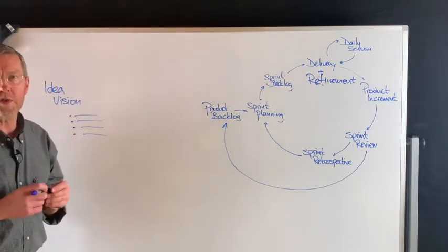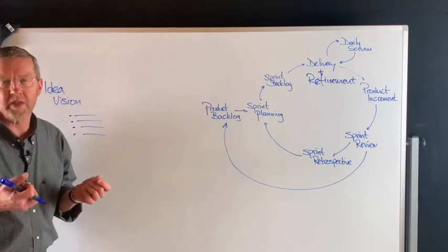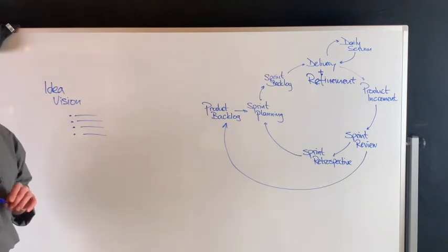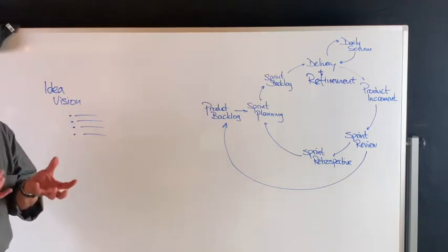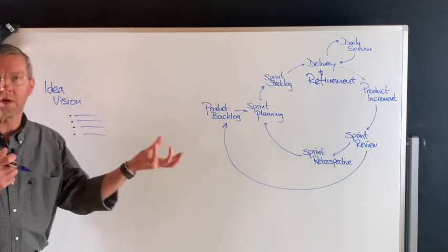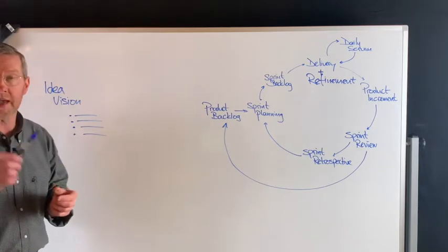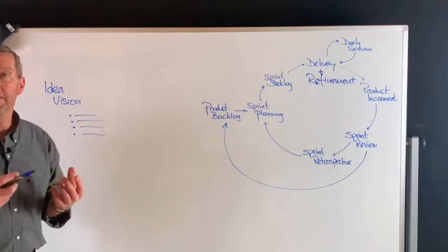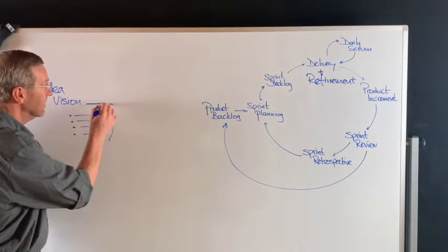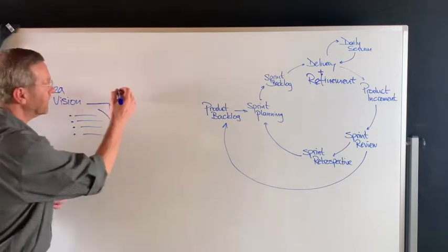Do a first run of the refinement with a group of specialists and say, hey, I want a new super duper marker, and what am I missing in this picture? There's one person from manufacturing, a material specialist, and a usability specialist, what's a handy marker, etc. And that group brings that vision and that initial list to a more complete product backlog.